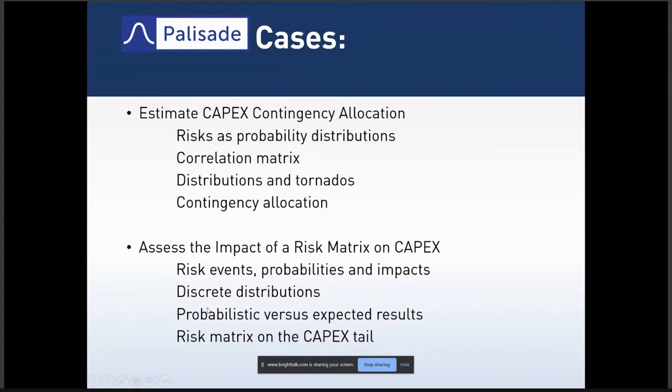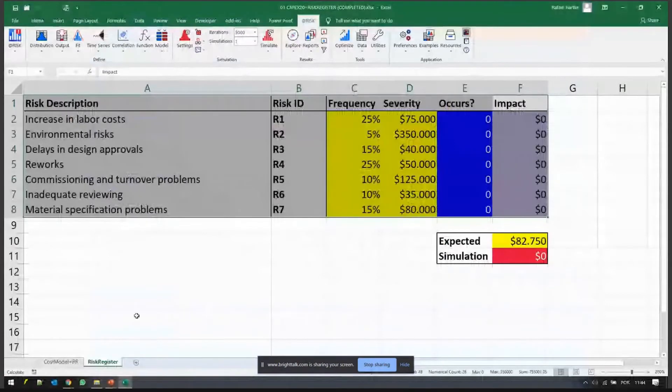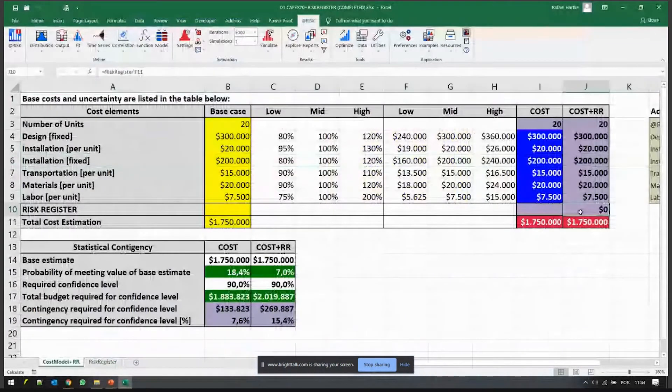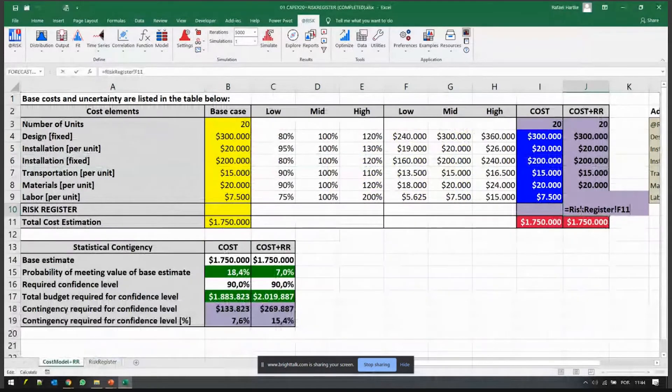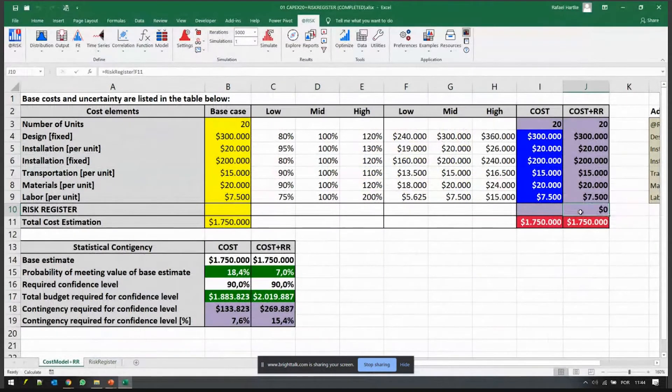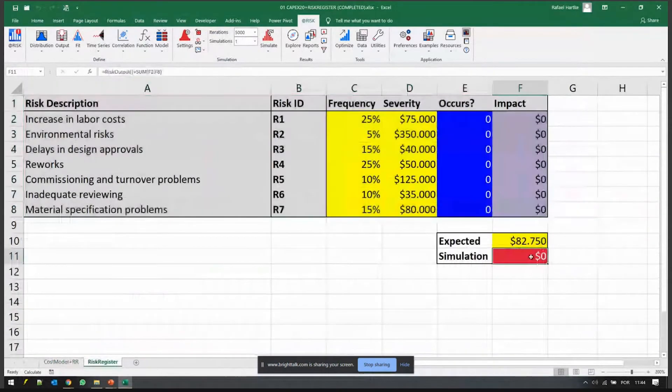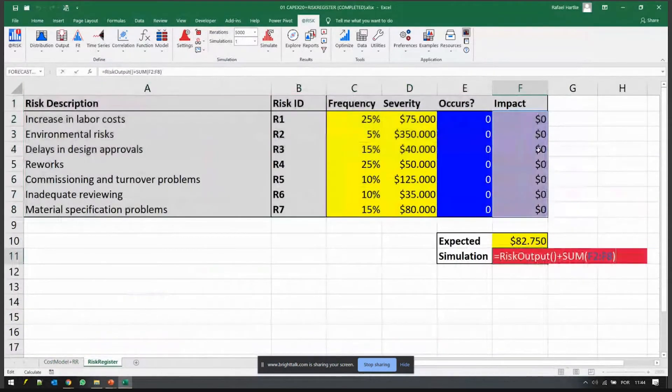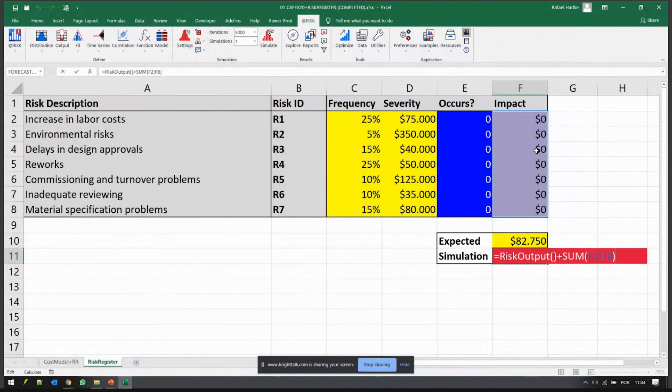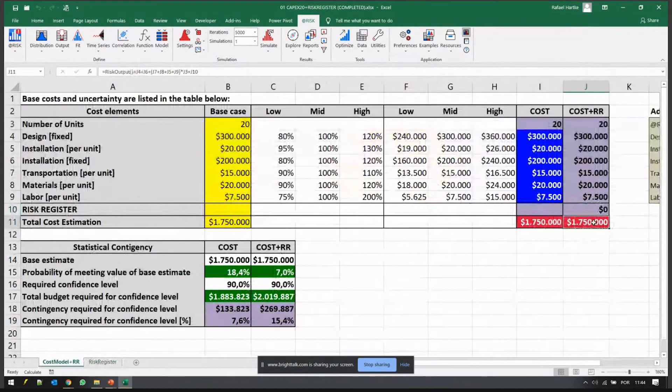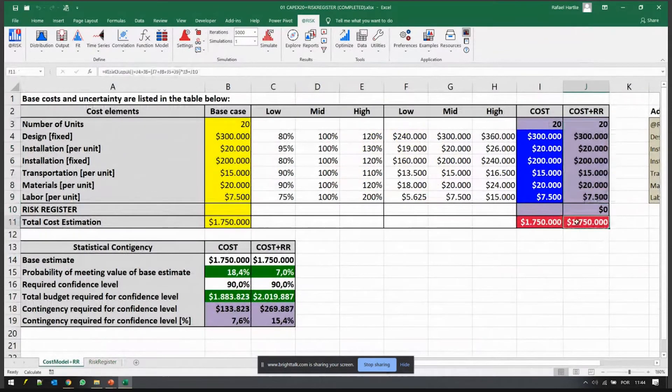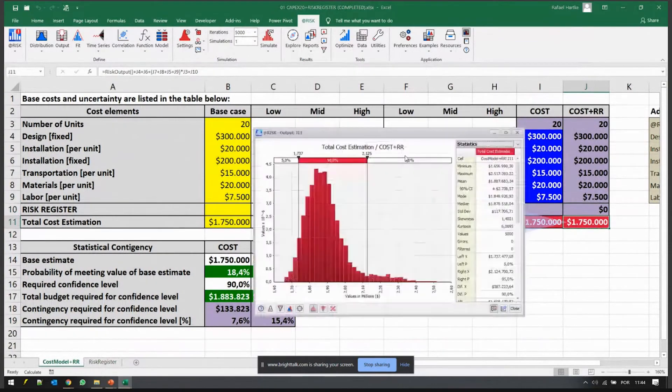What we can do now is of course add this extra cost - I'm adding it here in plain Excel. I'm adding that output from the other page, F11. I'm just adding that to my model. So here F11 is the output of my risk matrix, just the sum of all the costs, usually zero but it might be something else during the simulation. So I'm adding that extra cost here and now I have a distribution that accounts for all the risks plus the external risks.